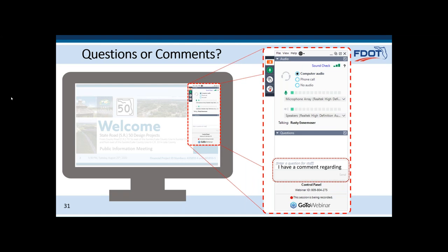Okay, what is left to be done on section four other than acquisitions? We just turned in what we call our phase two design plans, and that is roughly 60% complete. We are in the process of updating those plans to start our final design and quantities. So a vast majority of the design has been completed. It's a matter of doing cleanup and getting quantities and getting bid documents ready to go to the next stage.